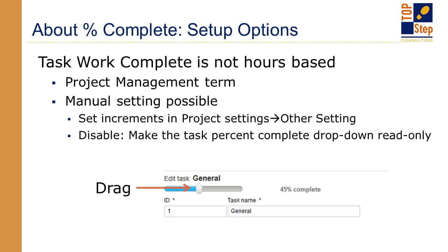And the increments are controlled in the administration module, whether you want 5% increments, 25% increments, you've got control over the incremental levels there. Again, this does require diligence for sure, and definitely some internal communication in terms of what constitutes a project being 45% complete if you are going to leave it up to more of a qualitative and subjective measure by the project manager.